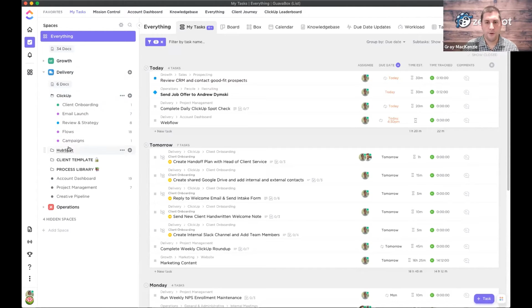So we've got folders for our clients. We'll get to these templates a little bit later in some of these other lists. But inside of that, we're going to continue breaking work down from the high macro, the client engagement, into specifically a day by day. As we're living in the daily activity that needs to get done, how do we get real specificity around what's on each person's plate, where tasks and deliverables stand in the process? So we then break down the structure into lists. These lists, which ClickUp has, are essential. You're not allowed to create tasks without being a part of a list.